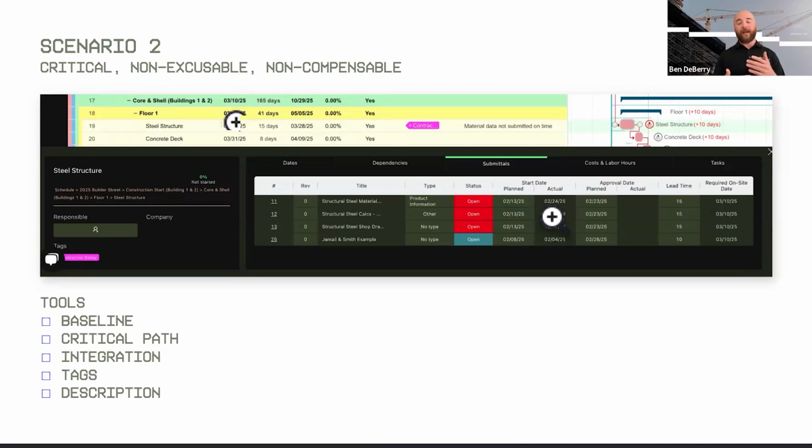And if we flip that on its head, we could possibly see just the opposite, that maybe our actual submittal date was earlier and then our approval date came late. And so that pushes it back on, well, that was an issue with our specs. That was an owner decision. That was our design team not getting back within that allotted 5 or 10 days.